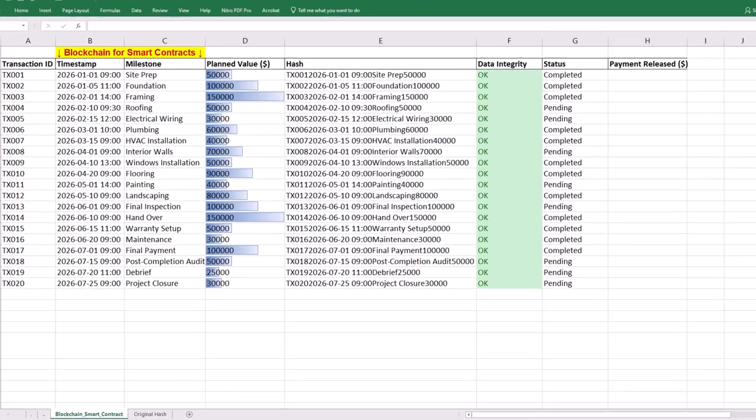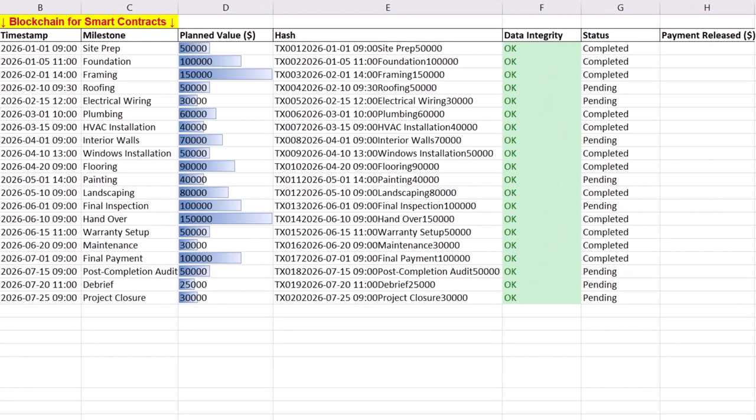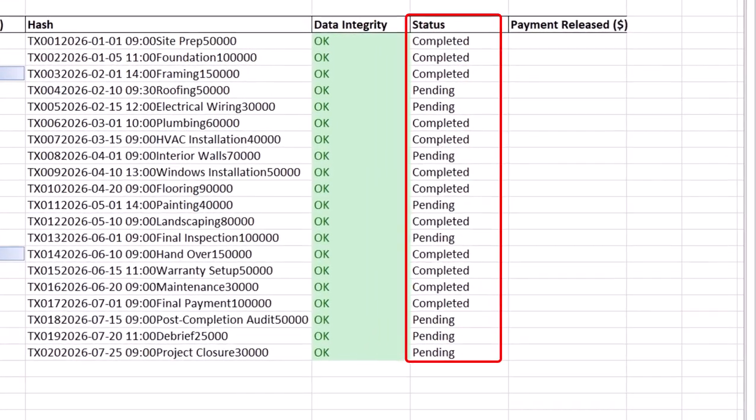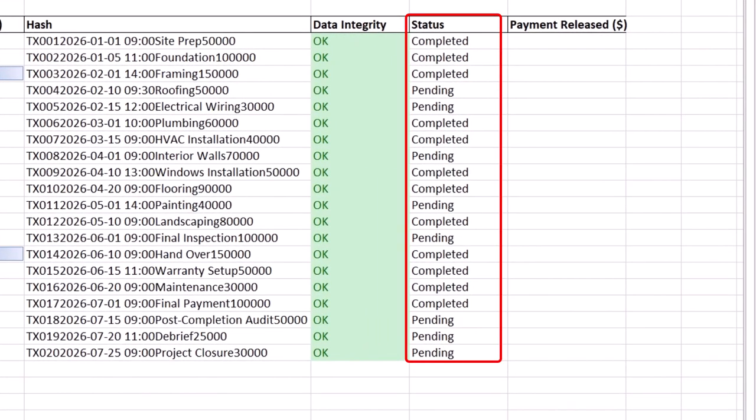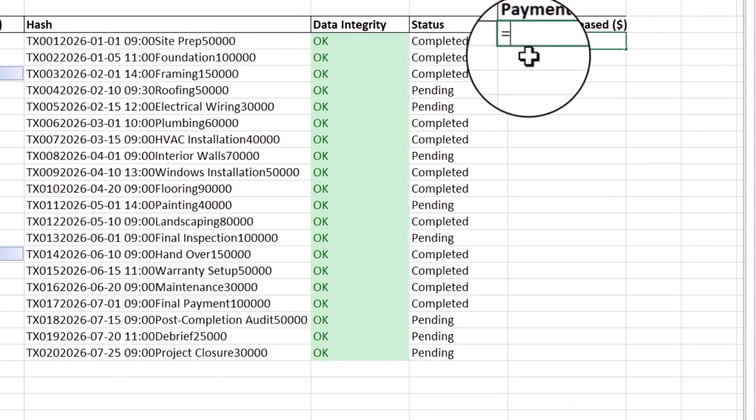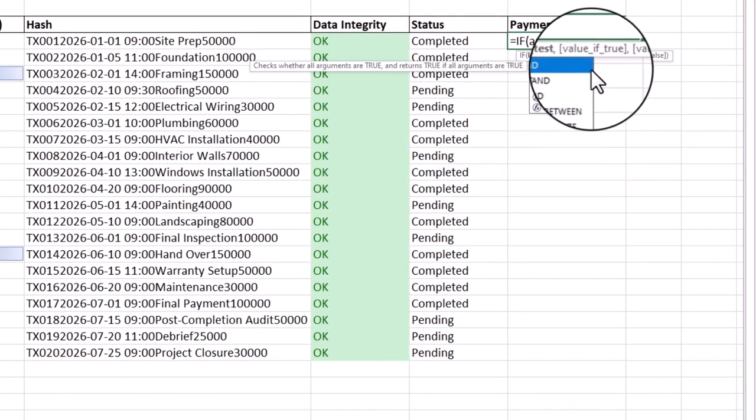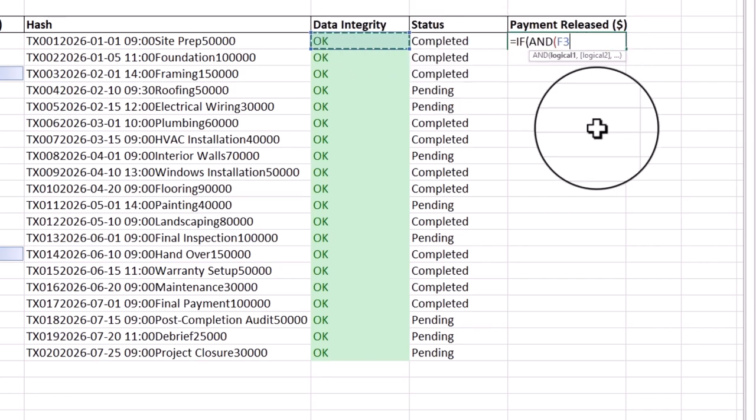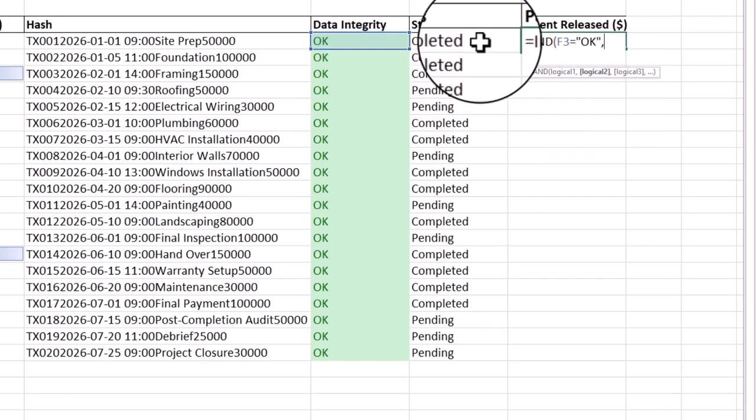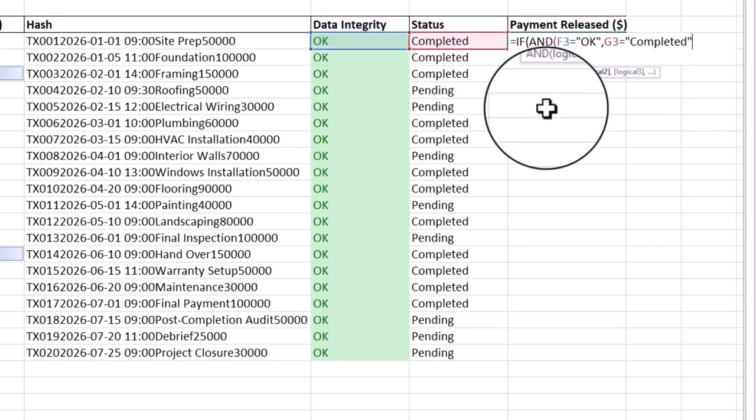Step two is releasing payments in smart contracts. Using blockchain technology, payments are only triggered if a milestone is completed and data integrity checks on tamper-proof records are passed. We must first obtain milestone status from the project side and then use IF and AND functions with two conditions. Data integrity checks must be OK and milestone must have achieved completed status.